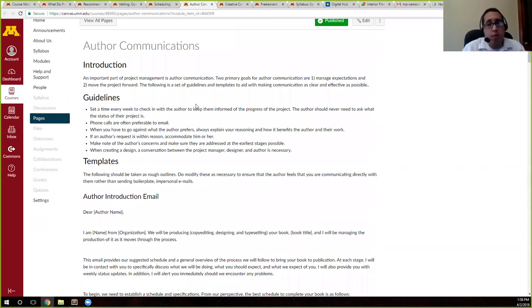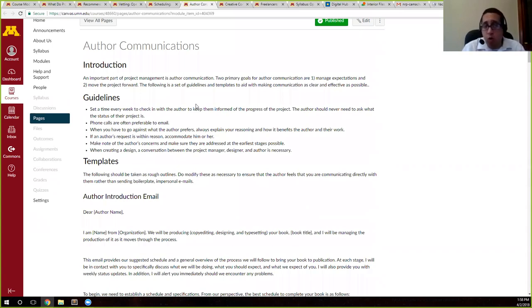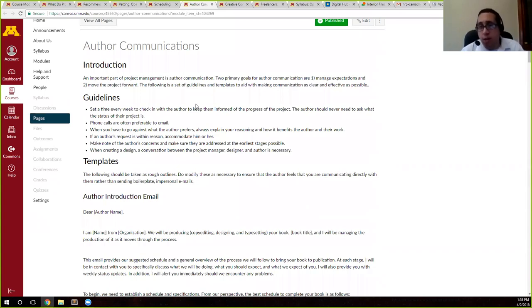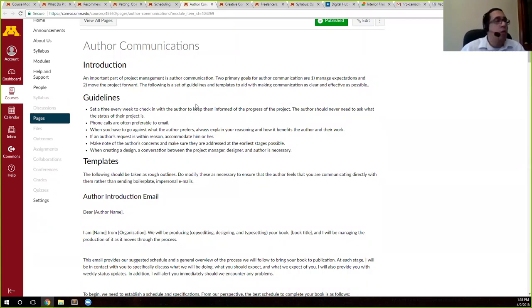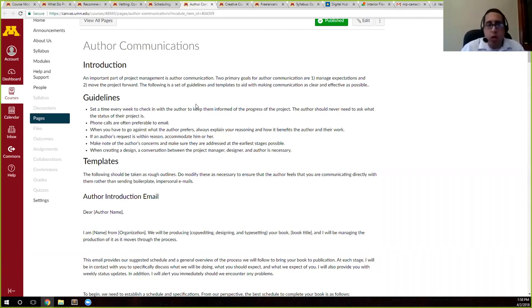This is something that we do here. We usually use Thursday, so that way if something is going wrong, people do have time to respond. You never want to set up like a Friday check-in, because when you discover something that needs to be handled, and you discover it on Friday, that's not going to be handled until Monday.